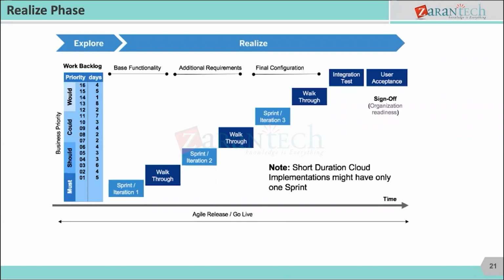We are involving the business at every stage to review the progress and suggest if something is not working for them. So we get the feedback, we come back to the office, and work for a few more weeks based on the last feedback, making any corrections and bringing in a few additional configurations. Somewhere again in the 12th week, we go for the second round of walkthrough. By this time, the system will be like 65-70% ready.